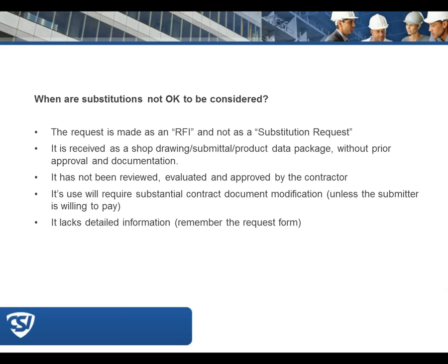And then a follow-up to that, Kevin: if it was approved using the change order system, why would it be entirely the contractor's problem to fix? The architect's approval, in my opinion, is based on the information that the contractor submitted. And the contractor certified on the substitution request form that it would fit, it would not be a problem. The architect's entitled to rely on that certification. So once it's incorporated into the change order and it becomes a change to the project, it's still going to fall back on the contractor, because all the decisions are based on him saying this is going to work.